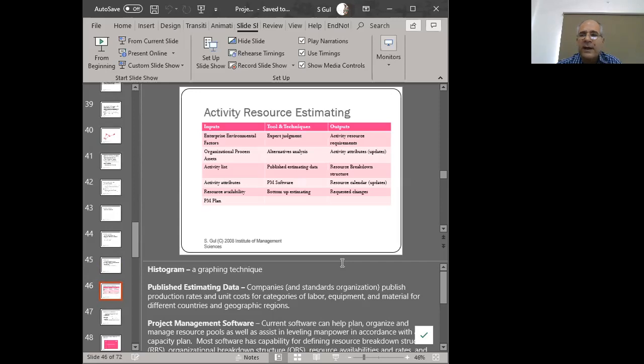As a sponsor, I would have some other contingencies, which I'm not aware of as a project manager. And the principal would have their own contingencies, which have not been shown to the sponsor, and so on to the project manager. So there are different levels of contingencies. If the project manager exercises their contingencies and needs extra time, they have to request the sponsor. If the sponsor exercises their contingencies, they have to request the principal, and so forth, right? So this level of contingencies exists, and they remain hidden from the person lower down in the hierarchy.